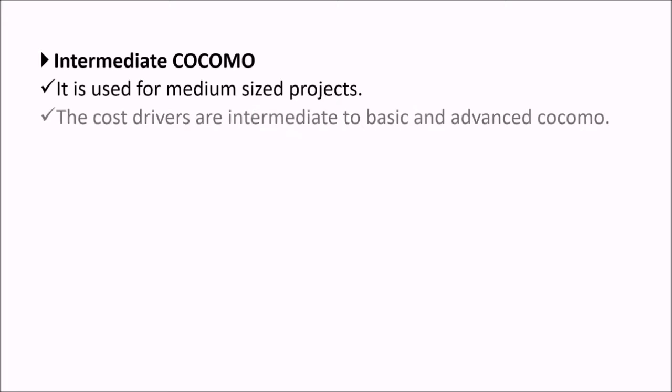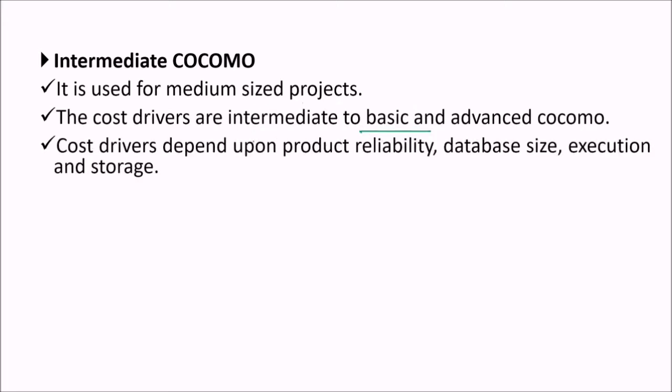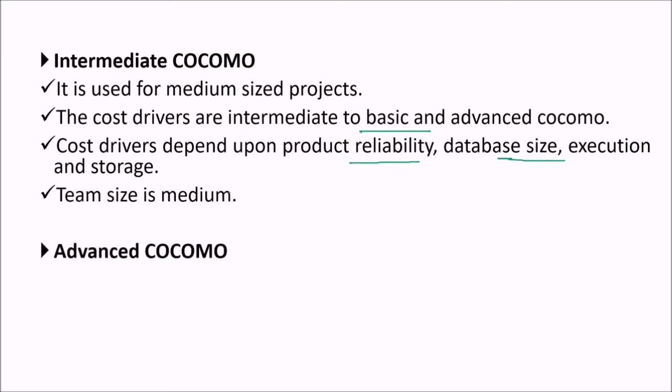Then we come to the intermediate COCOMO model. We have seen the basic COCOMO, now intermediate COCOMO. It is used for medium-sized projects. The cost drivers are intermediate to basic and advanced COCOMO. The cost drivers depend upon product reliability, database size, the execution and the storage. The team size is medium.